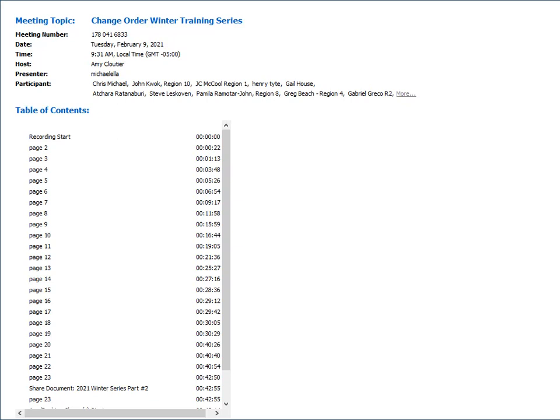There are the standard ones, but again, Eli mentioned, it depends on the magnitude. A $1,000 overage might be able to use a canned stock answer, but a $250,000 overrun is going to need more than just one line that the engineer's estimate was incorrect. And regionally too, your change order person can give you some direction on that.